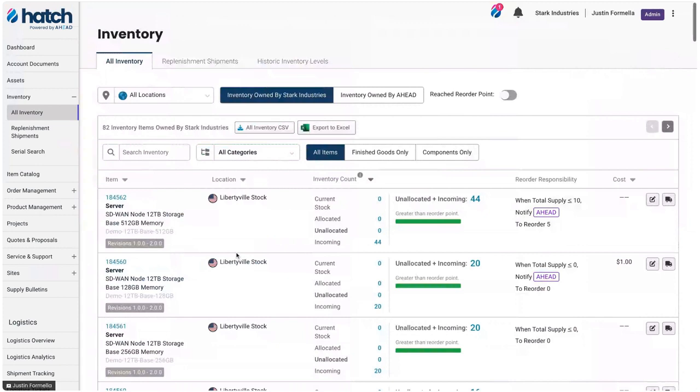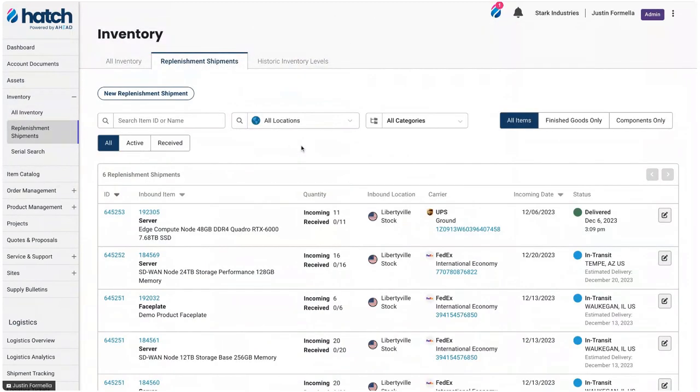And then in the cases in which there might be equipment that's coming in from an alternate source, we can track the inbound goods as well that might be merging up during a kitting or staging activity. And our algorithms use that schedule, the details on the inbound goods, to schedule the outbound orders.